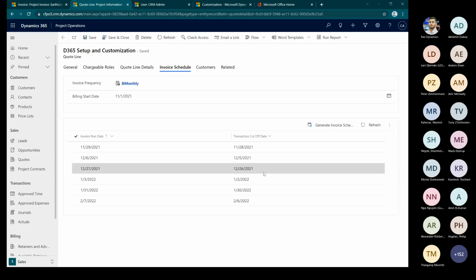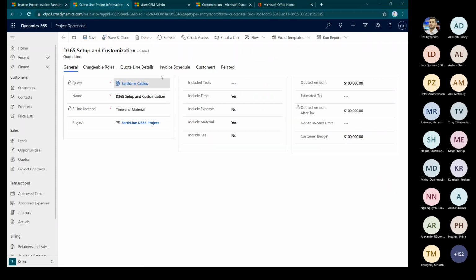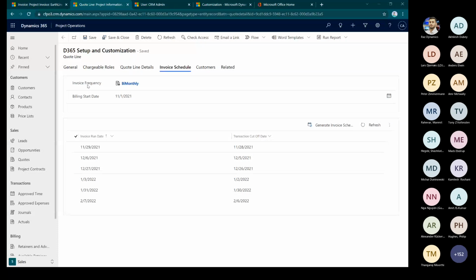So this is what the schedule is, because the schedule doesn't know what amount is to be deducted, right? How much amount the invoice should be. And if I had fixed price, it meant that I know it's a milestone, right? If it's a 100K project, and if in the invoice milestone have five dates based on the billing frequency, because you are billing bi-monthly and it's a 3-month long project, there would be like, let's say five invoices to be created. So it would have divided the 100K into five equal amounts of 20K each. So that's largely on high level how milestone and invoice schedule is.